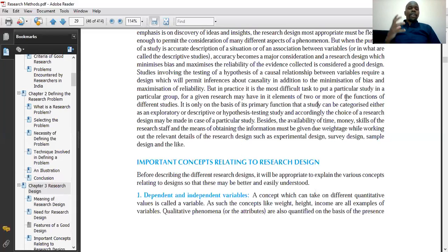You need to think about things that can happen, and these are things you can actually perceive, you can guess, you can create a probability of those things happening. For instance, during this weather, you know, anytime it can rain, okay? So what will you do? You will put an allowance for at least 2 days that will go unused because of rainy conditions, such kind of things, okay?